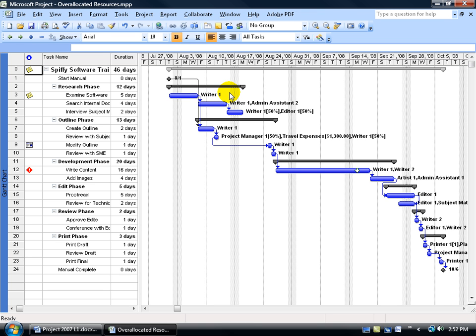Project doesn't just look at assigned typical hours to determine if a resource is over-allocated. It also checks if you're assigning resources on non-working days. My working days are Monday through Friday; non-working are Saturday and Sunday. If I schedule them on Saturday, they're over-allocated. Or if I schedule them on an exception day, a vacation, holiday, or a time period when they're not available — like my administrative assistant, who isn't available until about October 13th — and the project finishes on October 18th, so that person's over-allocated.